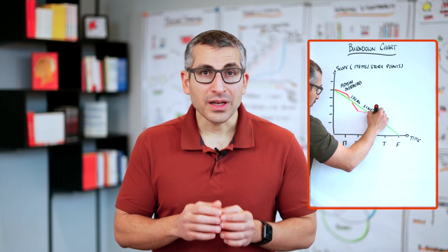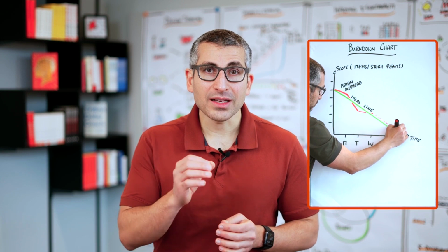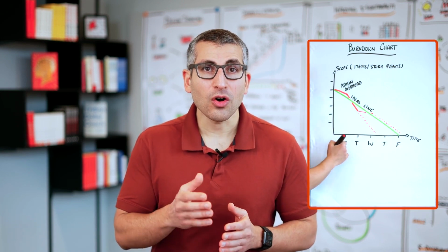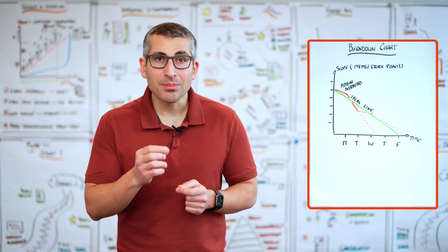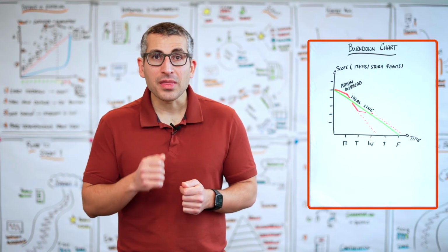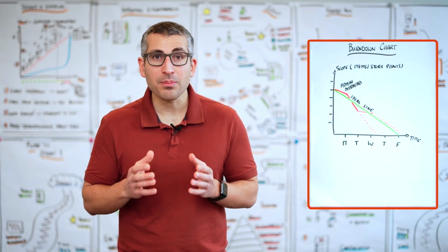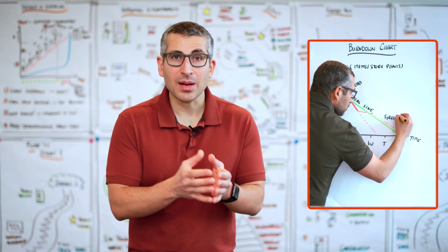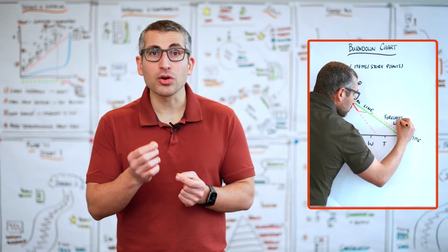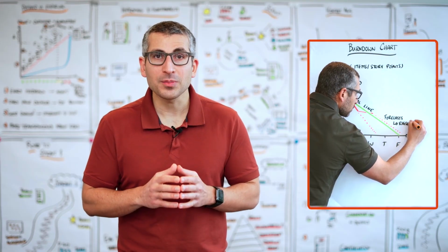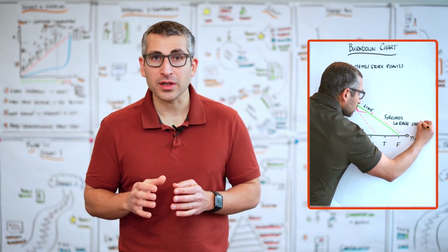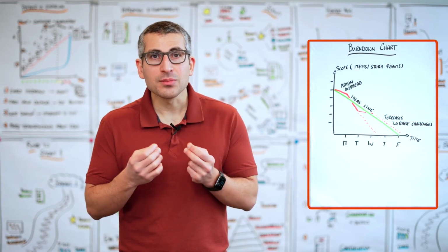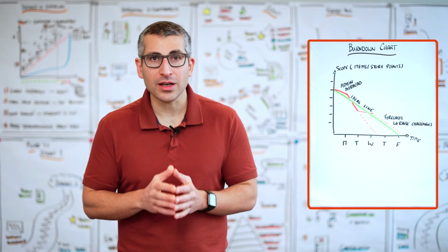A product owner can look at the Sprint Burndown and get a good sense of whether it will be achievable to meet the commitment or not. Whenever they believe the commitment cannot be met, they should ideally, the earlier the better, connect with their key stakeholders and inform them that some of the items that the stakeholders were looking forward to might not be delivered as part of this sprint. It's not that important what the reason is, it's more important to inform the stakeholders